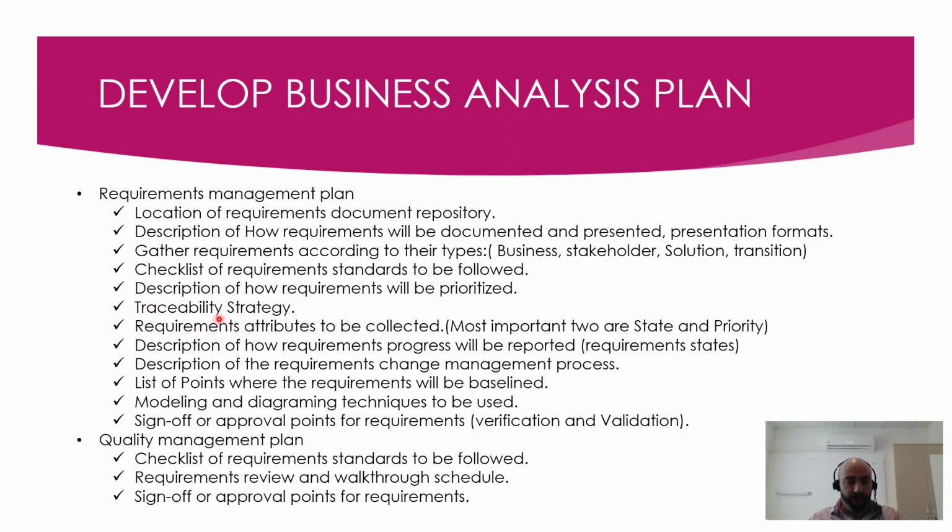traceability strategy, that's the traceability matrix, linking to objectives, linking to other requirements, requirements dependency analysis, and linking to solution releases. Requirements attributes to be collected. The most important two are state and priority. You remember we have the requirements attributes, and the most important is state, whether completed, deferred, accepted, rejected, what's the condition of that requirement, and its priority.